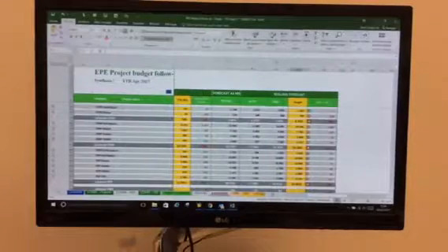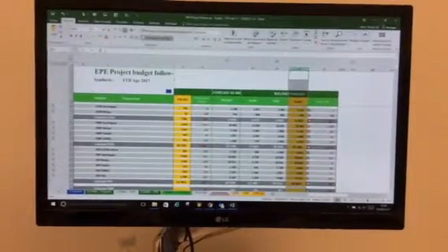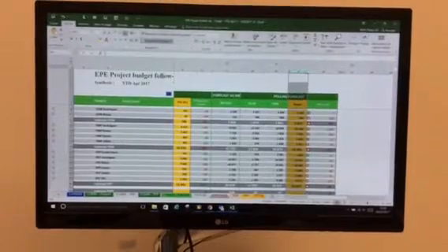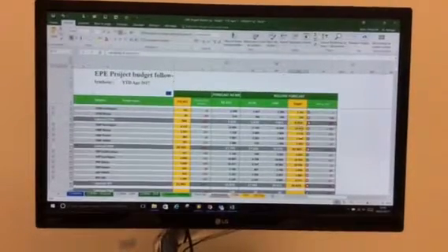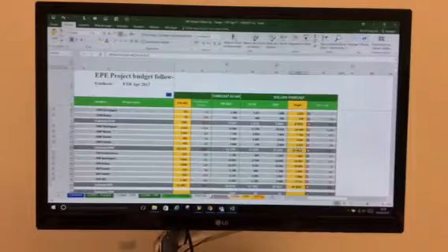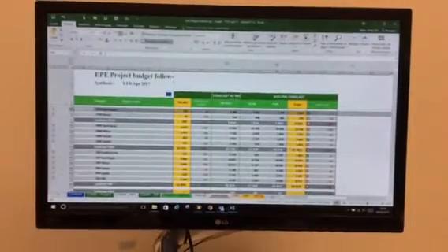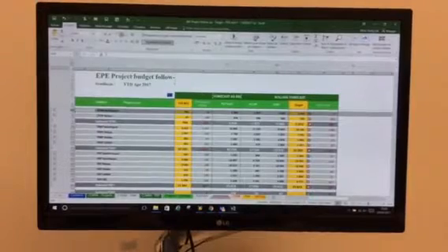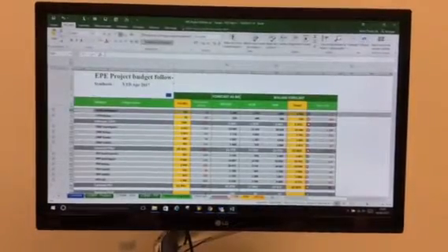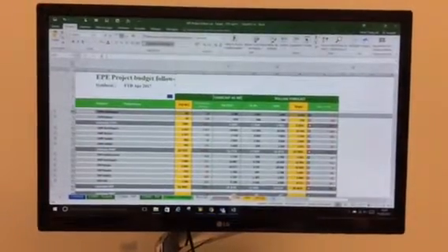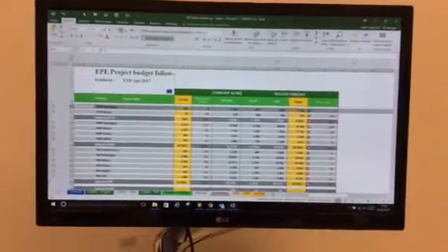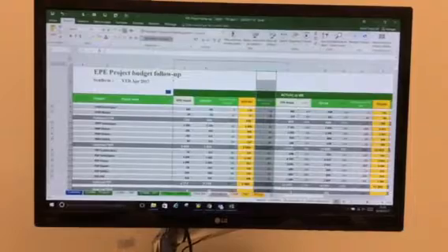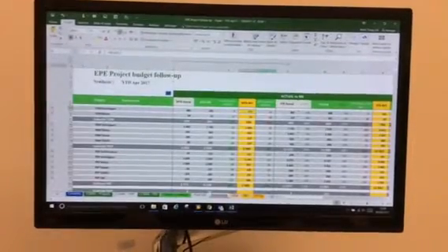The second comparison is on the target, on the budget. So by the end of the year, for the whole year 2017, we have given a certain amount of money to each and every project. For example, for OTM switchgear, we distributed 2,100,000 euros. 2.1 million for their project. So I also compare on the month, here is the linear target.